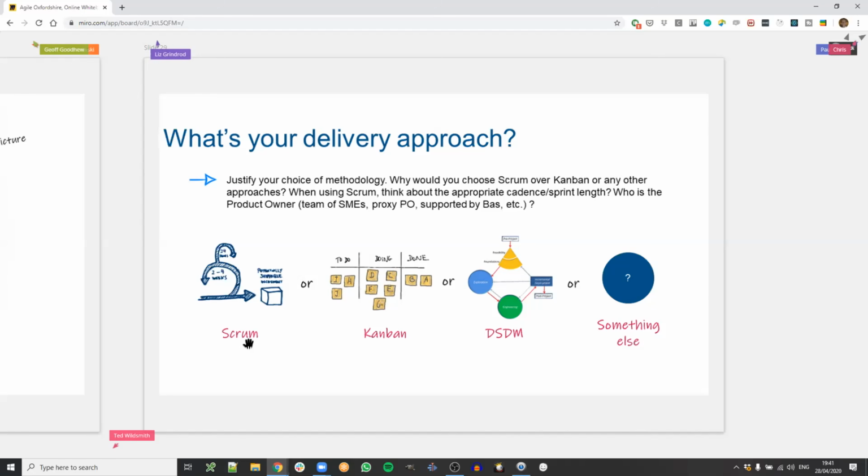You know, if it's Scrum, okay, are you comfortable with the sprinting idea? Are people really going to sprint, right? Or do you really deliver at the end of each sprint, or do you wait until you have 5 sprints and then you deliver, right? Or if you're going to do Kanban, okay, fine. But there are pros and cons to that too, right? Are you going to really give up the sprinting thing? That's fine if you're quite a mature team that can work really well. But that sprinting cadence can be quite good to bring people on board when they are busy and not easy to get to, right? For example.